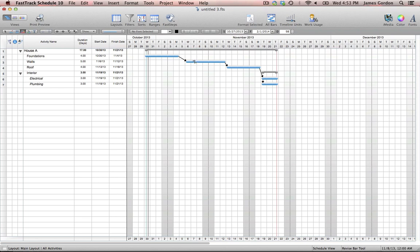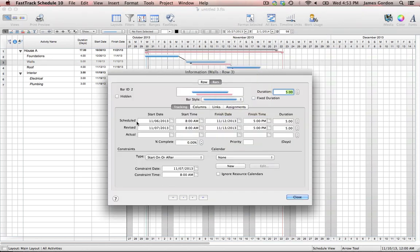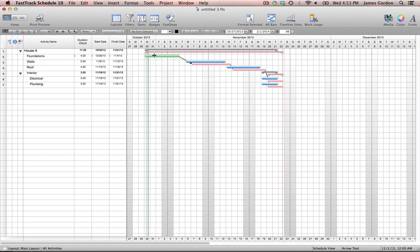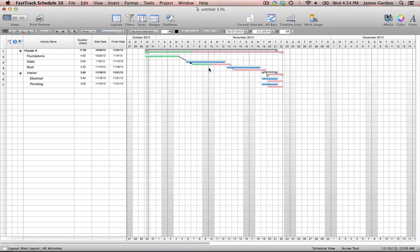Just to show you briefly how these revisions will work — if we push back our walls task by a day, as you can see all the tasks behind it will now get pushed back that day as well. You'll also notice that we have these pink revised bars show up. So now you can quickly look at your Gantt chart, see the original schedule dates and durations, but also see the new revised dates and durations because of that delay. You can also see all this information by going back to our bar information tab, seeing all the schedule start and finish dates and times as well as the revised start and finish times. Here you can also track your project as it goes along — if we have completed our first task of foundations, we can put in an actual duration of four days and that bar will turn completely green. If we want to show a task is only 50% complete, only half of the bar will turn green.